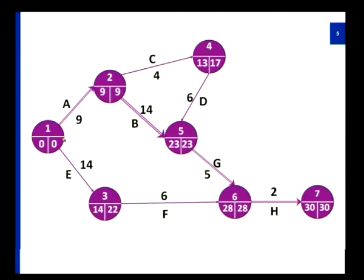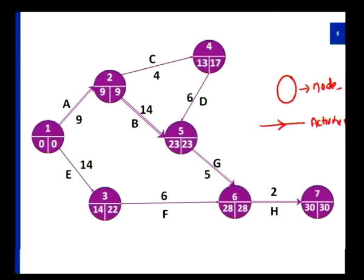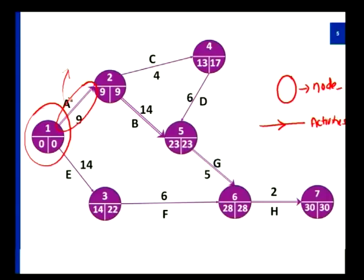After understanding the clear description of this list of activities, I will now give you a rough design of how the program structure flows. With the previous table, now look at this diagram. In this diagram, all the circles represent nodes and all the lines with arrow marks indicate activities. This represents an activity and this will be a node, which will indicate either the start or the end of an activity. If you consider A for example, this becomes the start and this will be the end, and this is the processing time required.